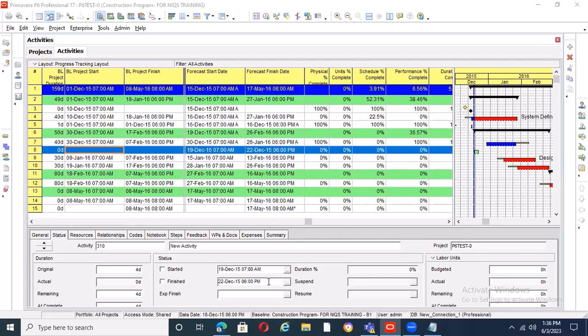I've seen companies that tried to take where I work to court, and they had to pay because they don't want the mess in the newspaper. One small indigenous company, you refuse to pay them, you are killing the contractor, and all of that. They had to call the guy and beg. Because do you know what it means? The name. And the guy has details, he has evidence. Oh, I bought XYZ, I've spent 70% of the contract sum importing materials. You did not pay me in dollars, you pay me in naira. Now inflation has caught up with it.